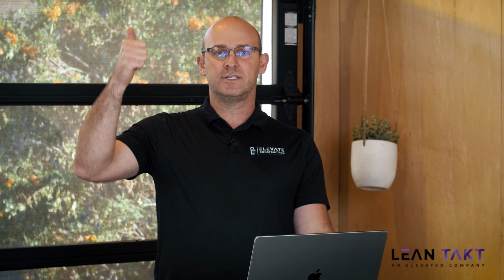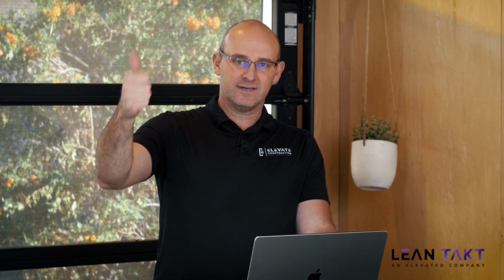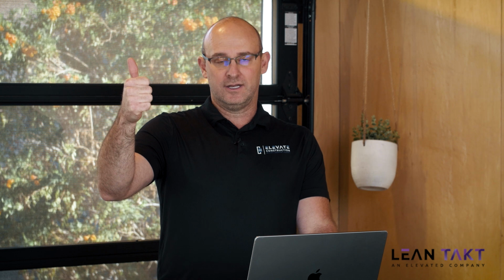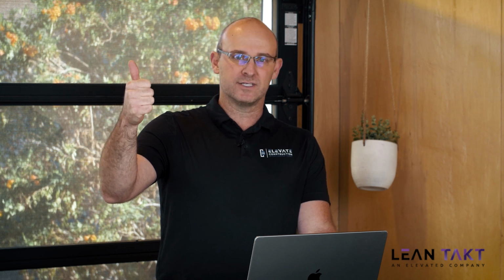So the meeting system goes starting from the beginning, your team weekly tactical. This is where you and the team huddle together, get an overall strategic plan, and balance and level the team and get coverage and manage things like PTO and who's doing what on the team and your biggest risks. The second thing is the strategic planning and procurement meeting. You can actually merge these two, but the strategic planning and procurement meeting is going through your overall strategic plan and making sure procurement is aligned.